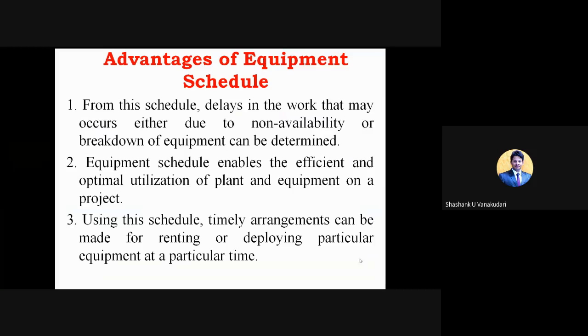Using this schedule, timely arrangements can be made for renting or deploying particular equipment at a particular time. Once you prepare this, we will know that on this particular date we require this equipment. So you take that equipment well in advance so that its usage will be only in that particular duration.